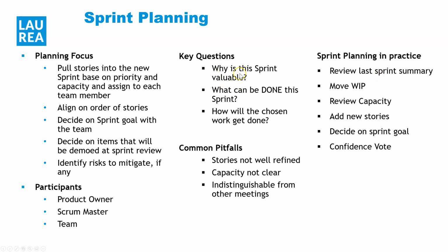Here we have key questions like these, but the main point here is common pitfalls. If the stories are not well refined, not specified well, then during this time you'll be wasting time. Capacity not clear, so you don't know how your team members are doing. Okay, in terms of, is somebody on holiday, is everybody working full-time, those kinds of things, then you need to take into consideration. And of course, distinguishing this from other meetings.